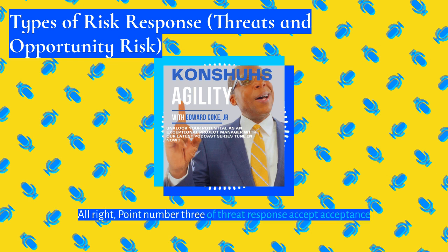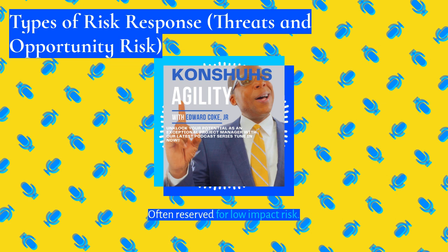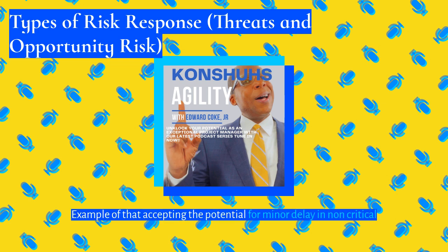All right, point number 3 of threat response: accept. Acceptance just means that you take no proactive action to deal with the risk, often reserved for low impact risk. Example of that: accepting the potential for a minor delay in non-critical project tasks due to unforeseen interruptions.